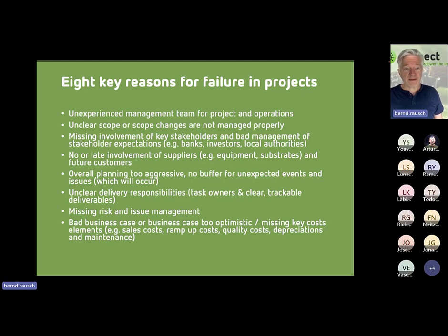Yeah, and then that leads nicely to the next step, which is the missing involvement of key stakeholders. So make sure if you plan your project that you're not doing it in your, let's say, internal silo, but involve the key stakeholders you need. That can be banks, that can be investors. And first of all, at least in Europe, I would strongly recommend very early as well the local authorities, because they need to give you the permission to run the farm.